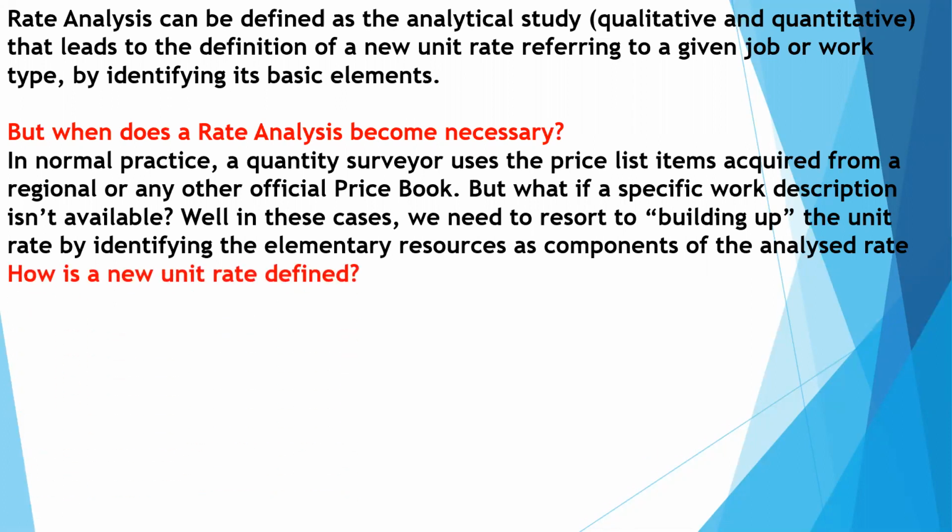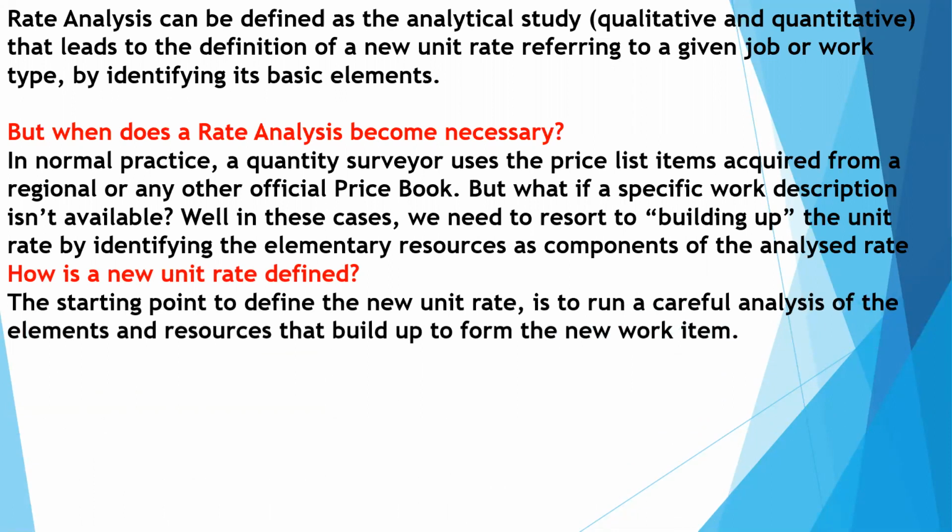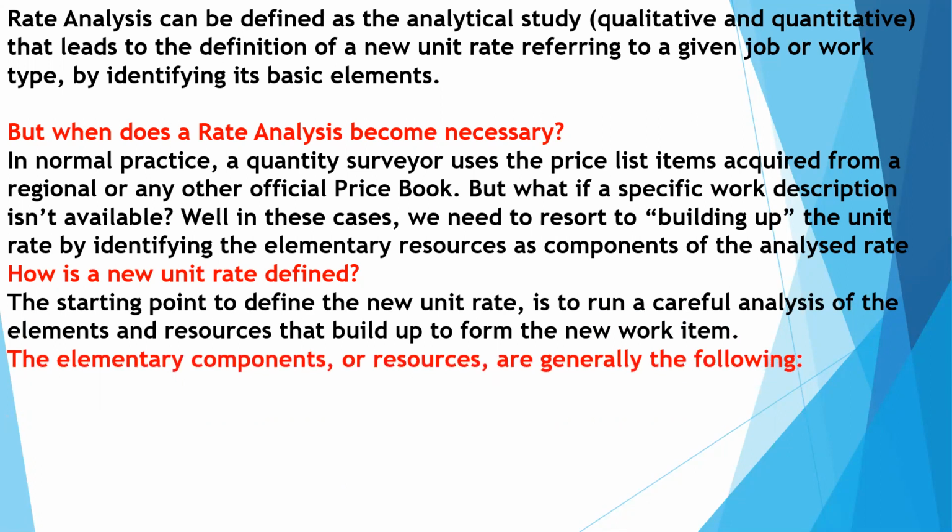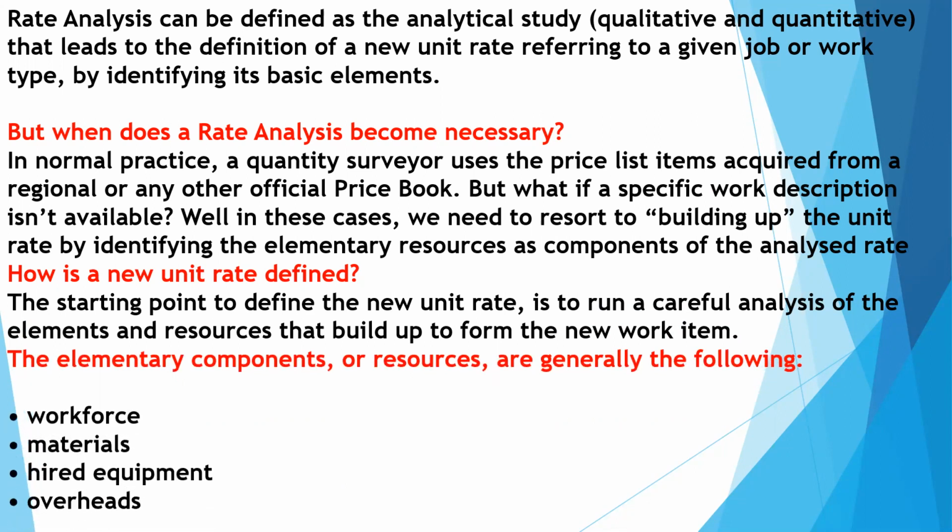How is the new rate defined? The starting point to define the new unit rate is to run a careful analysis of the elements and resources that build up the new work item. The elementary components of resources are generally the following: workforce, material, hired equipment, and overheads.